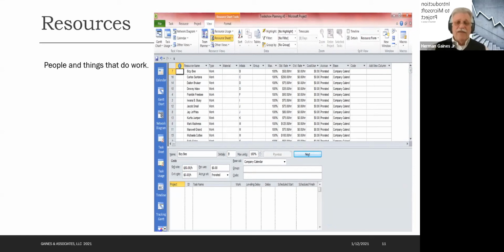Also in here, there's actually a resource called a cost resource in Microsoft Project. So I could have travel as a cost resource or printing as a cost resource. And when we go to printing, I already know how much it's going to cost, like per page. I'm going to send 50 pages off. It will do the calculations for me of what it costs for me to do that printing at the specific time defined by where that task is in my schedule.